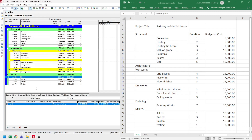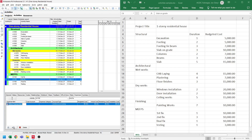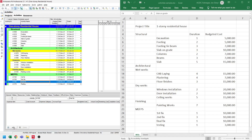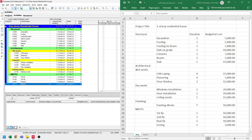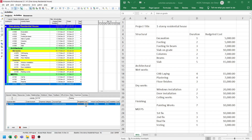Now for the second fix, let's select the second fix. Click add, rename the expense item, and set the budgeted cost to $10,000. Now for the final fix, let's select the final fix, add an expense item, and type in the budgeted cost which is $10,000. Now for the last activity, that's testing. Let's select the testing. Click add, rename the expense item, and set the budgeted cost to $3,000.